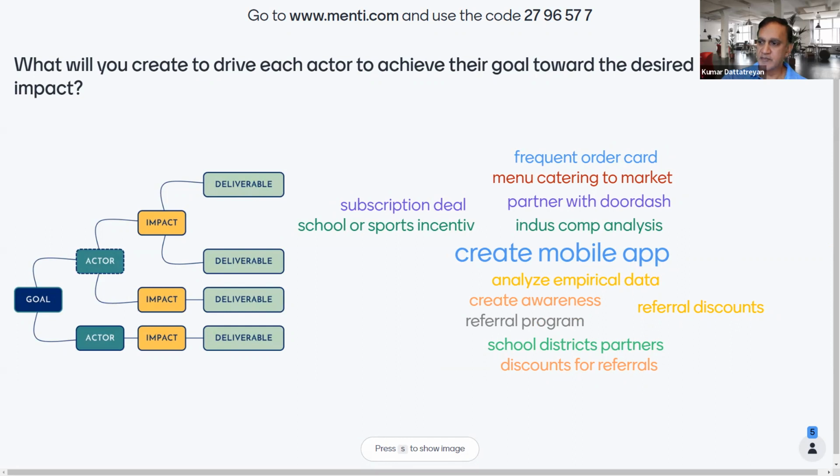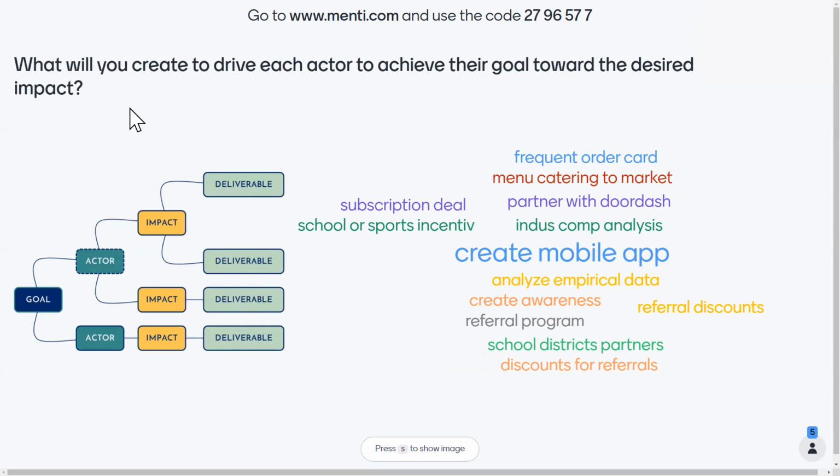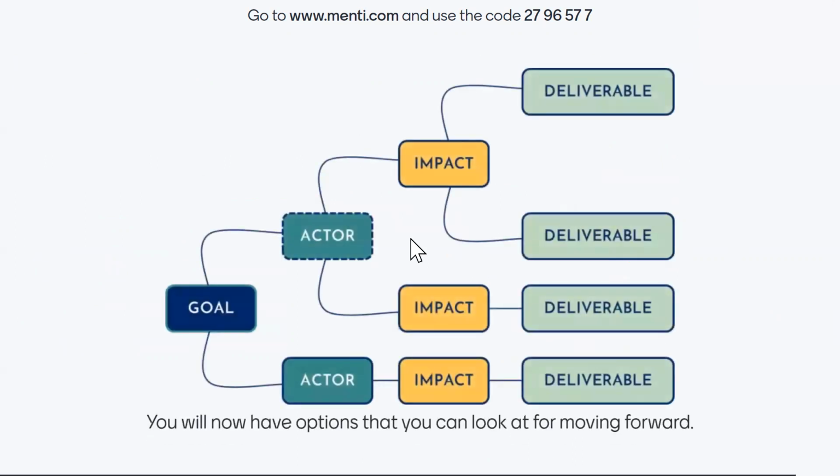Yeah, absolutely. So you're saying that the inputs to an impact mapping session would be the defined goals, a clear understanding of the shared vision, the why, the identification of metrics, and competitive analysis. Those things will definitely help to have more fruitful and more valuable impact mapping sessions with more alignment and less uncertainty around the things that you've gathered and agreed upon.